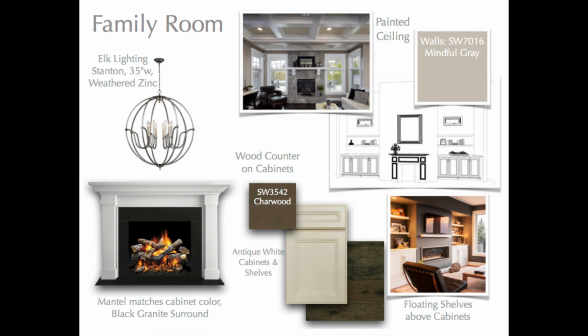Now, when you are in the process of choosing your specifications, you should typically offer at least 3 to 5 spec templates to your contractor that they can choose from, similar to a builder. Having a spec template makes everything easier on all parties. It reduces costs through bulk buying, there is no guesswork, less time is required, and it's very beautiful to the end users. So a tip for you guys is go to a presentation center, take a photo of their design templates, because the builders have already spent money hiring interior designers to produce that design template. So why reinvent the wheel when you can just copy somebody else's?